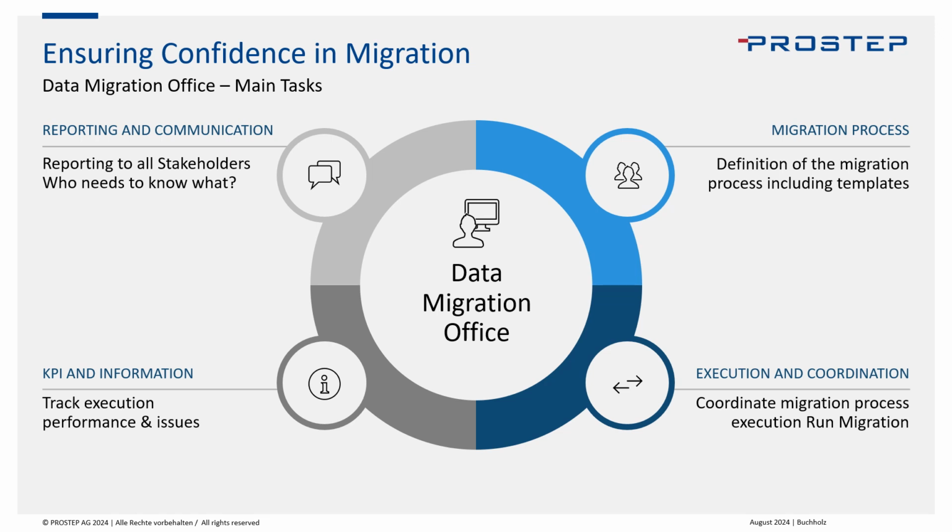So that's number one. Number two is the data migration office is the owner of the migration process itself. So everything that you're changing in the migration process needs to go through the data migration office, because everything that you change might impact the templates, for example, that you give out to the corresponding stakeholders for preparation activities and these kind of things. So it's a very good thing to have one central role which really maintains the whole migration process from start to end.